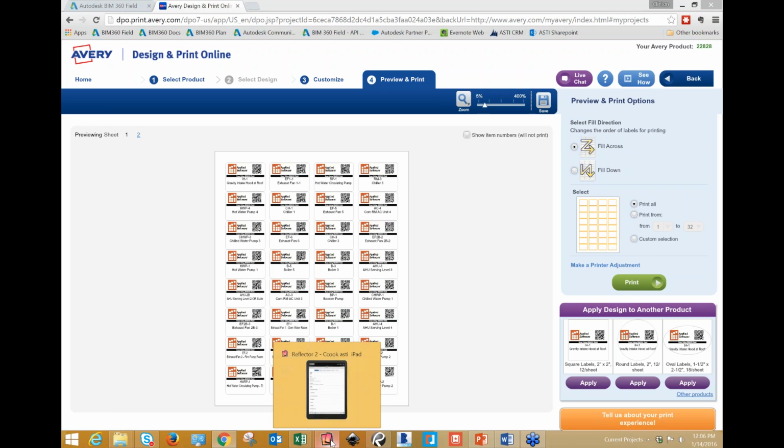Okay, so that's a good question, and the answer is you can utilize the QR codes that come with the actual equipment. But keep in mind, what we found is that a lot of QR codes or barcodes, for instance, a barcode on a door frame, you're going to have maybe 100 3070 door frames in your project, and each one of those barcodes, the alphanumeric string behind it, is going to be the exact same.